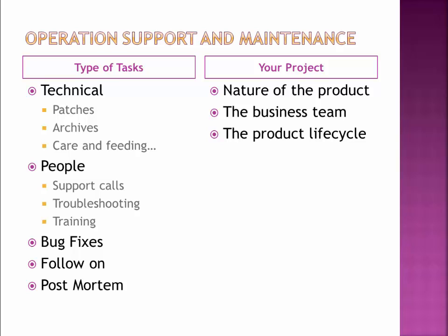But then we also have to support people. Who's going to handle calls? Who's going to troubleshoot the system? Who's going to do the training for people to do those things up front? In the organization I work in, we have an entirely different team that does support than does development. The good news about that is the developers can always be focused on the next features. The bad news is we have to have a whole training cycle to get the support people aware of what we released. How did it change? How do they debug and support these things that happen?